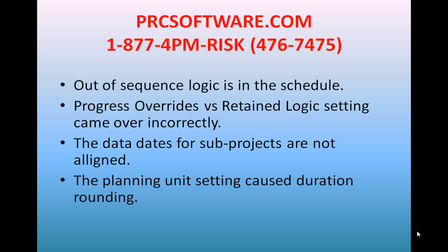One of the things is out of sequence logic, especially with progress override and retain logic. If any of those settings come in incorrectly, you really shouldn't have out of sequence logic. That should be cleaned up. But the progress override and retain logic switch could do that in Primavera P6. Best practice, clean up your out of sequence logic. Out of sequence logic by default is cannot happen, so it will schedule as you plan it to. However, it is not a best practice.